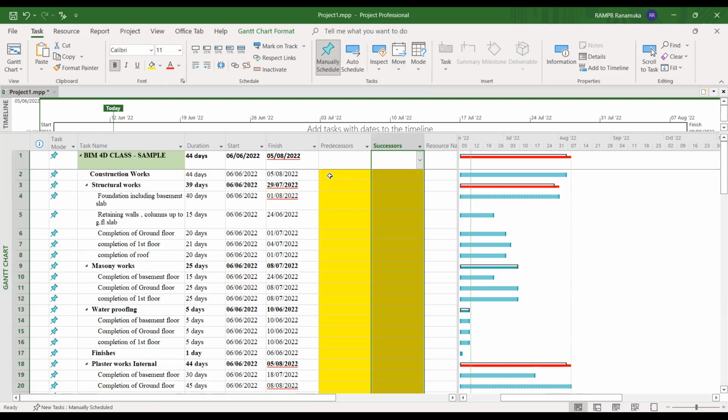So if you complete the formwork in 30 days, we can complete the reinforcement arrangement in 35 days. That's only five days behind the formwork. Otherwise, if I wait until the formwork completion, I have to wait 30 days for the formwork and another 30 days for reinforcement, so 60 days.